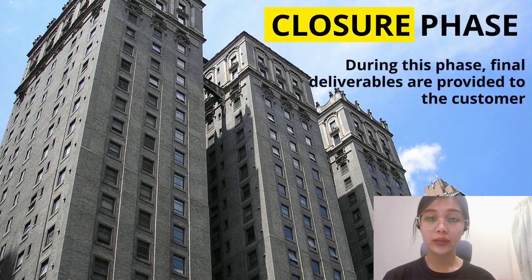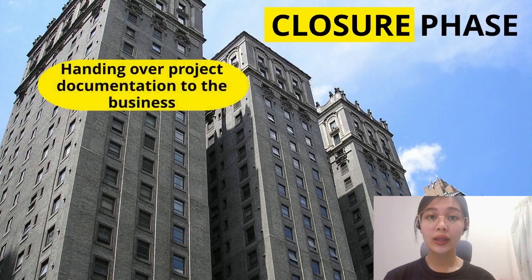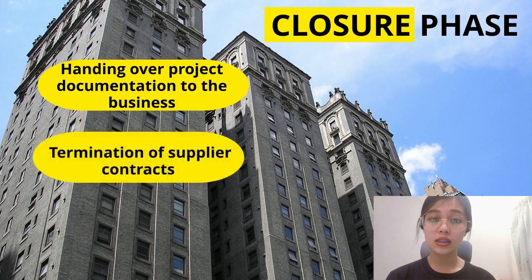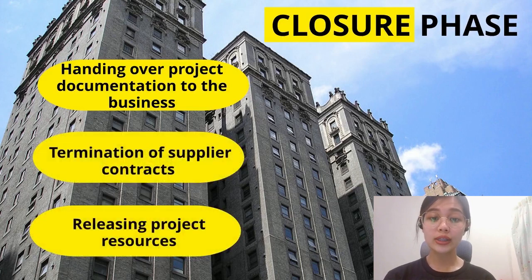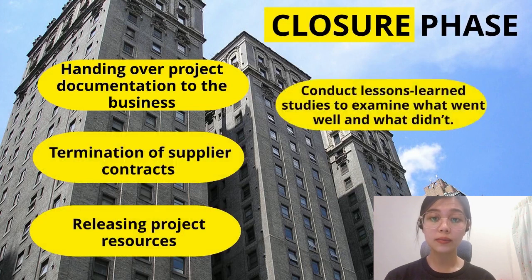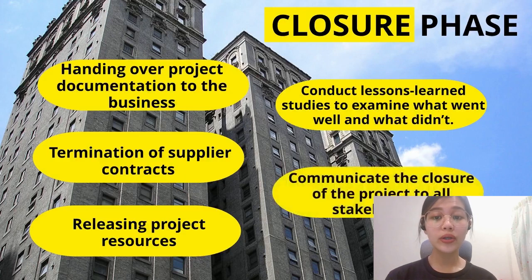Closure phase. During this phase, final deliverables are provided to the customer. This includes handing over project documentation to the business, termination of supplier contracts, releasing project resources, conducting lessons learned studies to examine what went well and what didn't, and also communicating the closure of the project to all stakeholders.